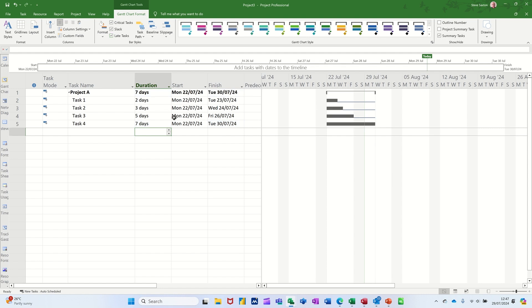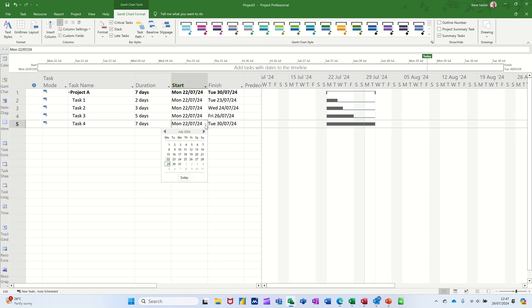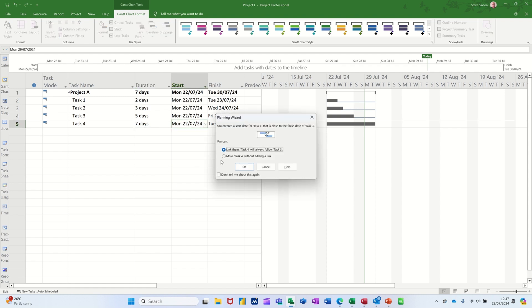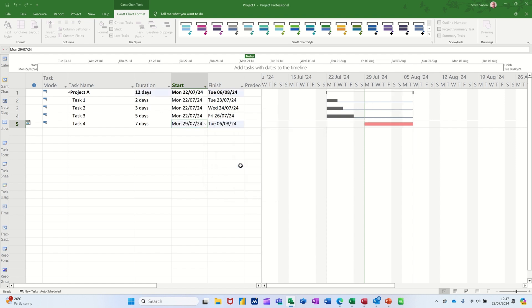Now late tasks - all of these are late because it's set to last week, the 22nd, whereas today is the 29th. If I change this task to the 29th without a link on it, it's gone red because it's critical. But if I take the critical tick off, it's showing blue - it is not black, it's not showing as a late task.